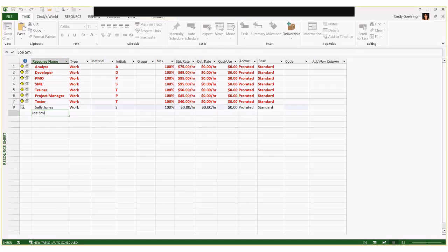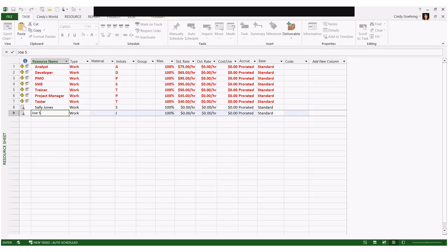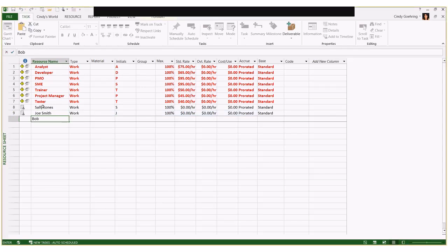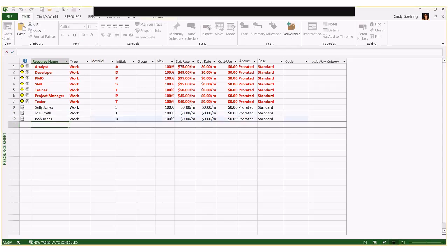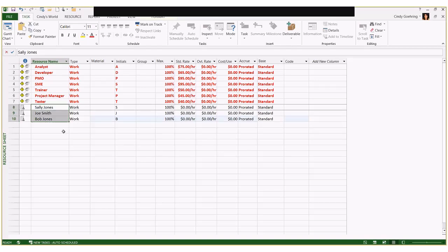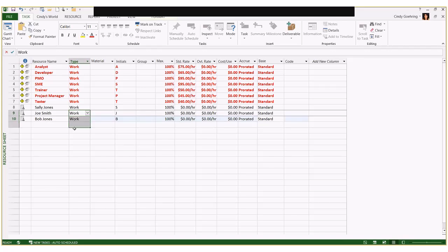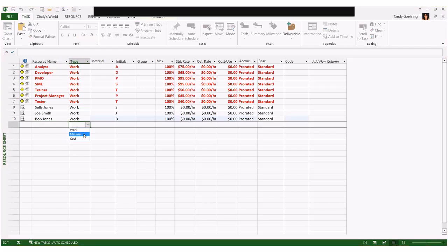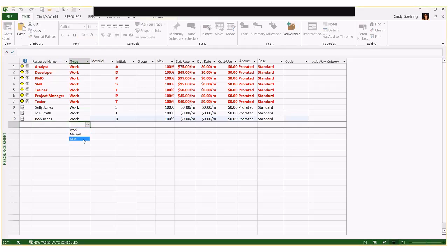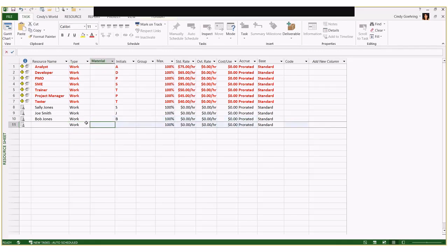Right-click the view bar on the left and select Resource Sheet. You can see resources already in the schedule. I'll add Sally Jones, Joe Smith, and Bob Jones as new resources. These are all work resources. If you wanted to capture travel expenses you could create a cost resource; for materials you could set up a material resource and track usage that way.